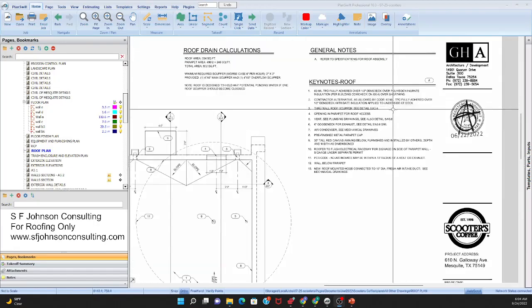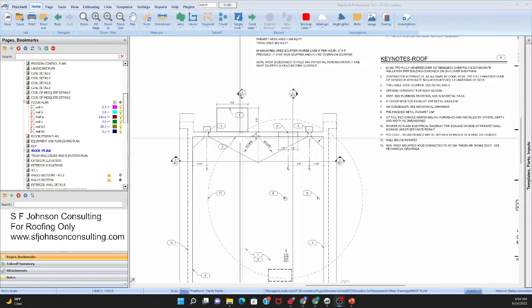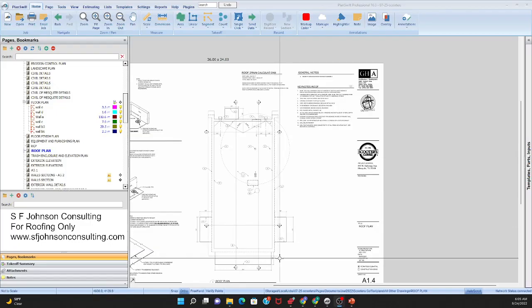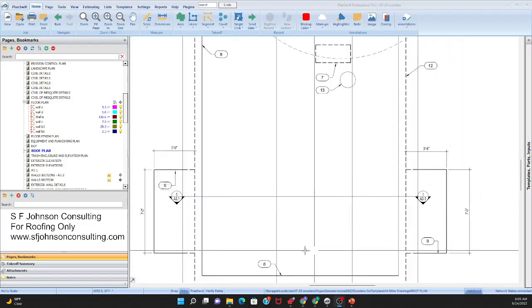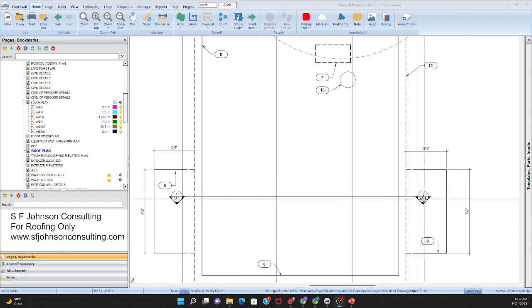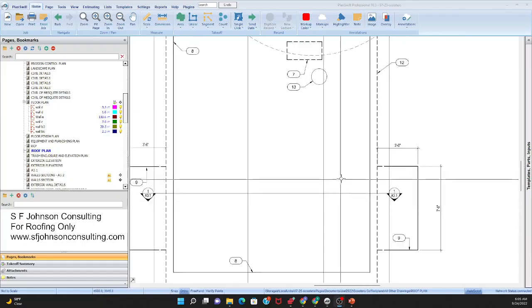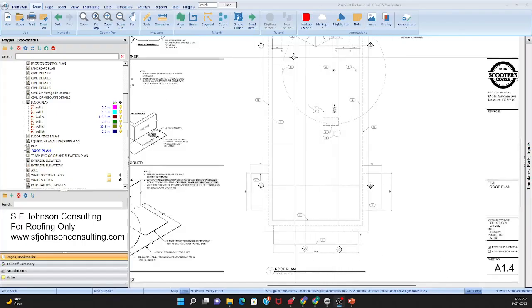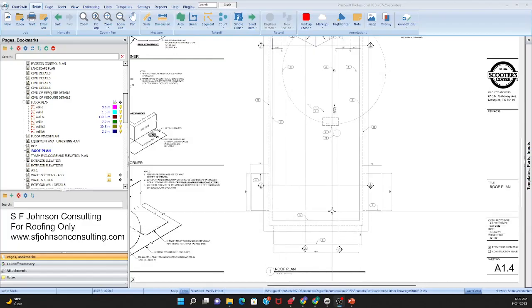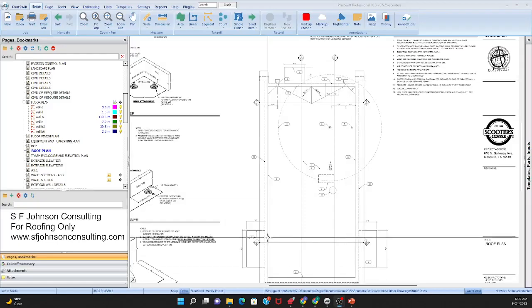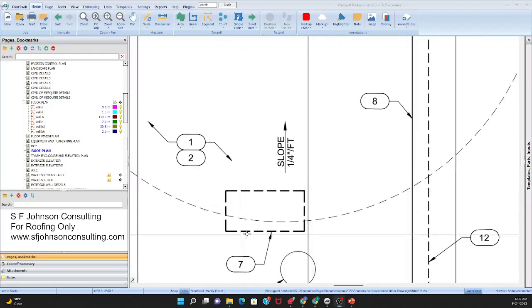So what do we have to do? How many square feet in total? We have to measure how many linear feet the perimeter is, because chances are the parapet wall goes the perimeter of the building. We're going to look at the section views. That's a building section view, so we can see the thickness of the insulation and all the other details, right? Because from the plan view, we can only determine how many square feet of the finish, plus how many linear feet.